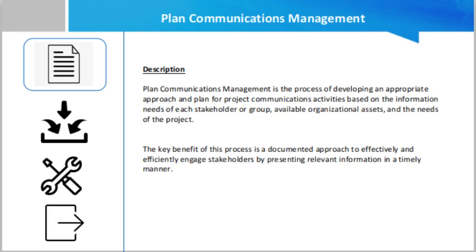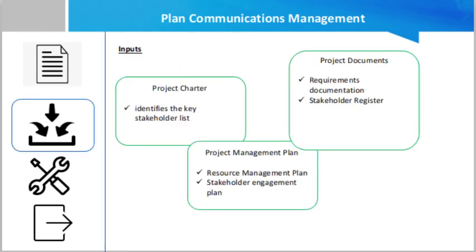It should be reviewed regularly, and modified when necessary, when the stakeholder community changes or at the start of each new project phase. Okay, now we shall discuss the inputs for this process. The first input is the project charter. Project charter basically identifies the key stakeholder list. It may also contain information about the roles and responsibilities of the stakeholders.